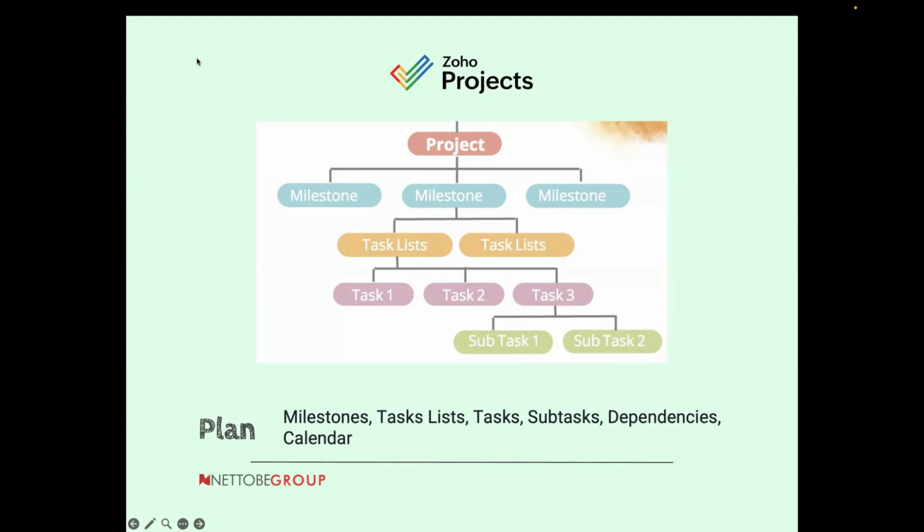Why is this necessary sometimes? It depends on the organization and what their project management rules are. But a good rule of thumb when you want to break down a task is that a task should be a minimum of one working day. For many organizations, that's 6 to 8 hours, a minimum of one working day and a maximum of 3 working days.